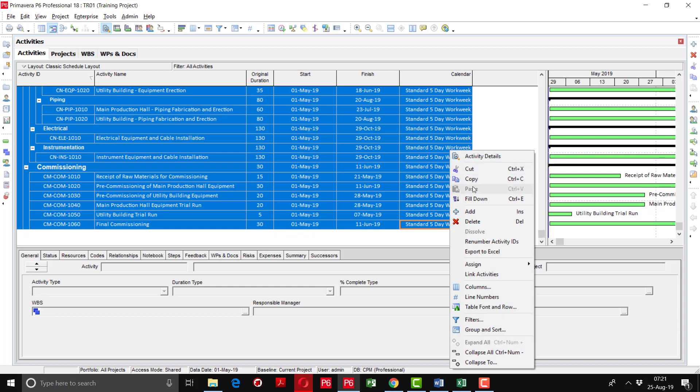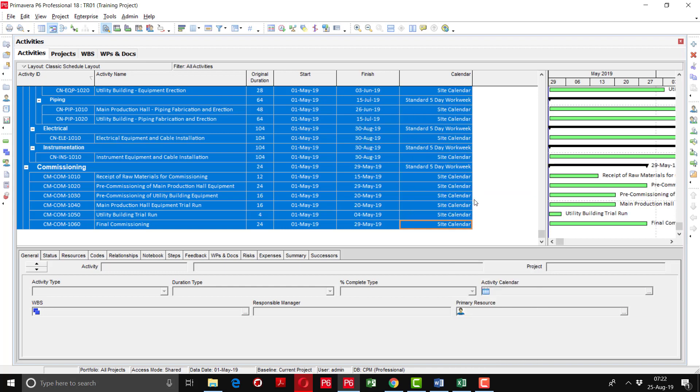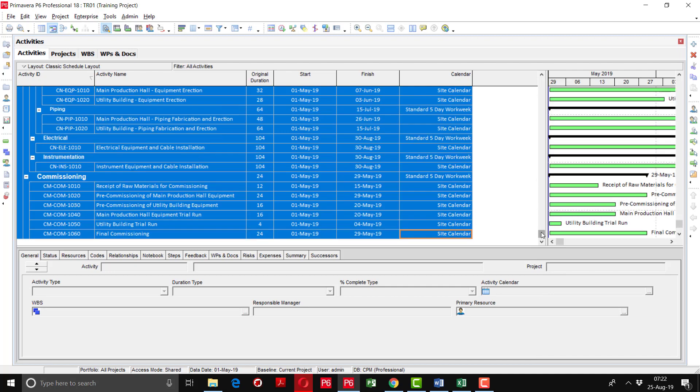I am going to change it by doing the right click and applying the fill down option. Here you can see that all the calendars have been set and applied to the activities as per our requirement.